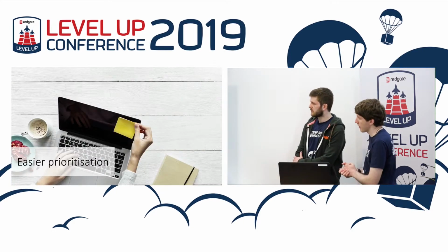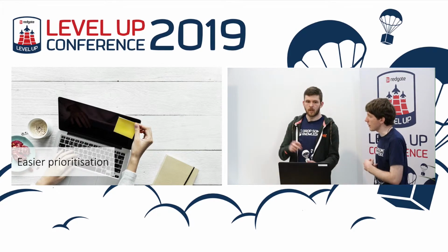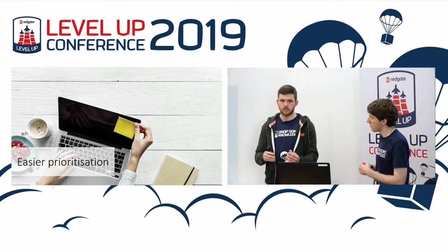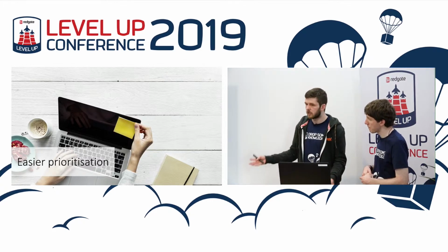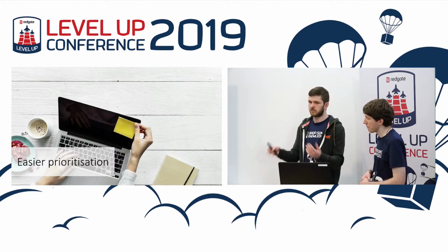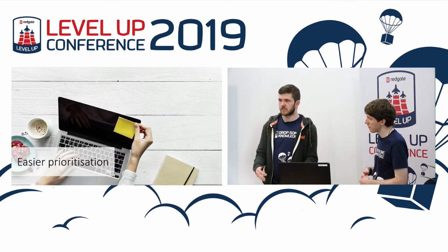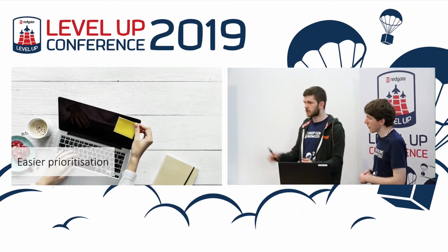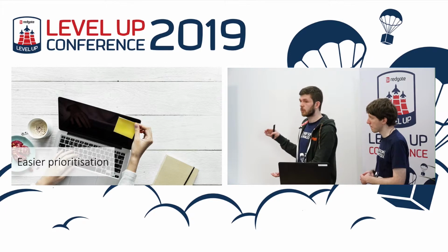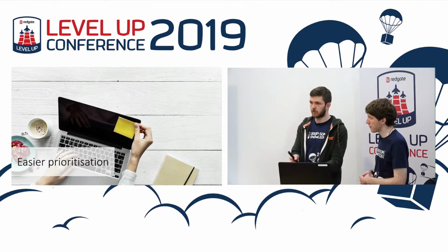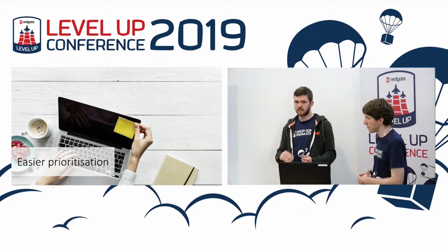Another big advantage for a dev team is easier prioritization. So, when your bugs come in, you don't have to faff about trying to decide which of the 30 are we going to do this time, maybe you're going to try and bring in 3 or 4. If you're working in sprints, as I know some teams are, at each sprint planning, you just say, okay, which bugs are we going to bring in? All of the open ones, and however many that is, they come in and you fit the rest of your work around that so that you can get yourself back to 0 bugs.